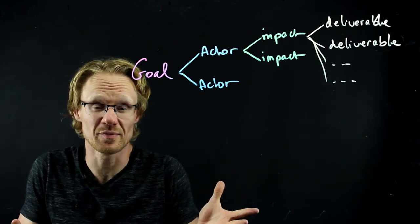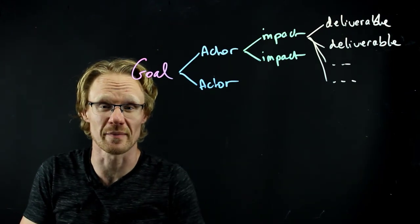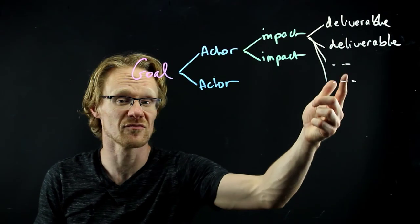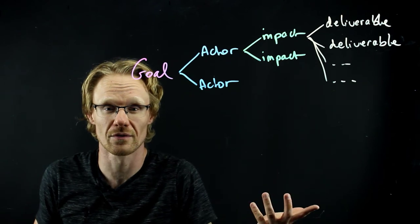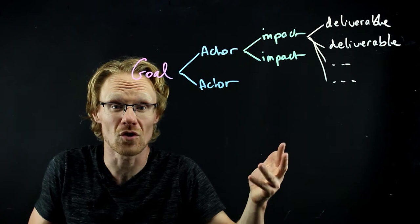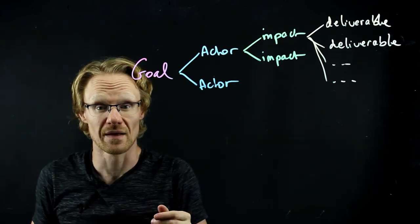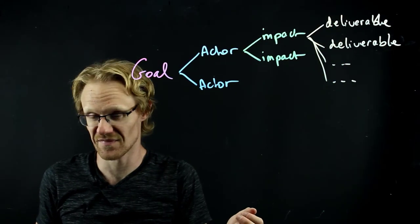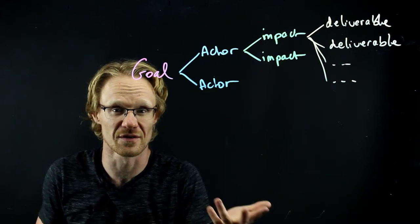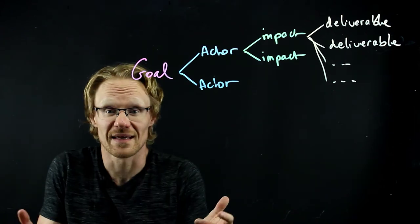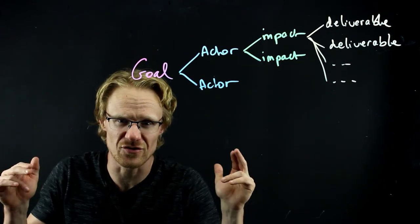The map itself is simple, and that's not what's actually brilliant about this. Number one — the list of deliverables here is like a backlog, the features you actually want to develop. But here they are all options. And once the goal is reached, you don't need to develop everything else. There's no need to implement the other features — you've reached the goal. And that's how you minimize effort.